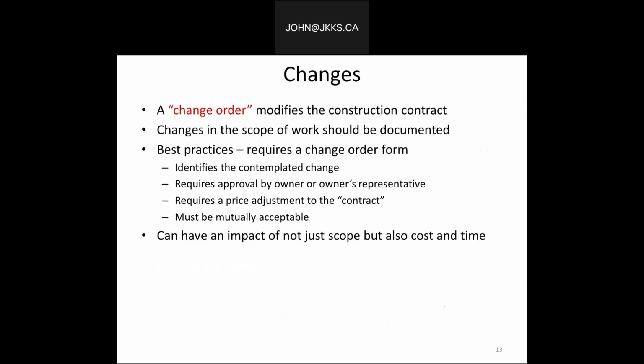I'm going to also talk a little bit about change orders, but I will also be doing another one specifically just on change orders. When we look at changes or change orders, it can be a difficult process that involves the potential for delays and, in many cases, additional costs added to a project. Once again, written confirmation is important for all parties to ensure that the change was approved and exactly what that cost will be. So a change order modifies the construction contract. Therefore, changes in the scope of work should be documented. Best practice requires a change order form.